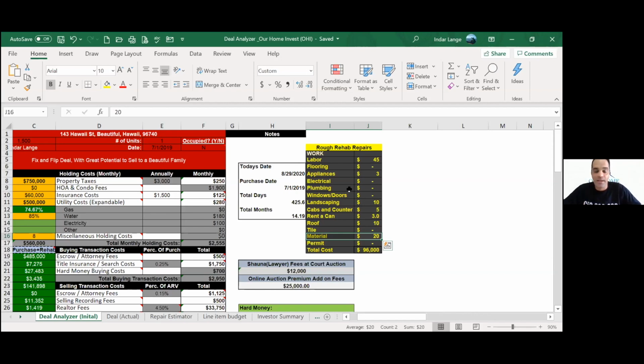And then you, on the other hand, I just posted this yesterday. I bought $20,000 worth from Home Depot, and I saved $2,500. I just saved $2,500 by going to Home Depot and getting my discounts, getting the things I needed cheaper, and saving money. And my contractor just has a labor rate. It's a little more work to manage, and you're constantly watching materials. It is more work, but if you can find a good contractor who can go purchase the materials, I call Home Depot checkout and I just do a text-to-pay. But I am now controlling my materials a lot better, and I can do returns at the end of the job and make a couple of 2,000, 3,000.